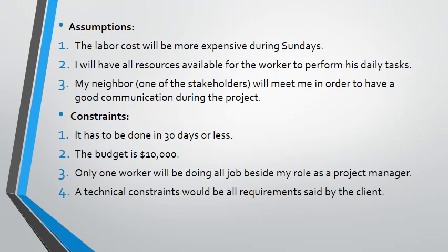On the other hand, the constraints are: it has to be done in 30 days or less. The budget is $10,000, no more. Only one worker will be doing all the job, besides my role as project manager. A technical constraint would be all requirements set by the client.